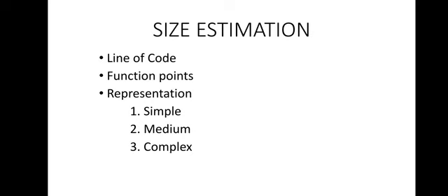First one is lines of code. As you know, line of code is a somewhat controversial measure, as it depends on the language, style of programming, compactness of programming, and so on. So LOC is a measure that represents a size estimate only for the coding phase and not for the other phases, such as requirements and design, which are not related to LOC.